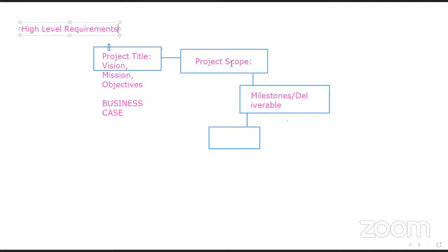Okay, so in the project scope, for instance, say building of a house, you may not want to give the whole complete outline, but based on your major deliverables, you can have foundation. Then on the milestone, on the deliverable, you have foundation to be delivered in 12 days at so much amount. That is correlating with what the scope is saying.